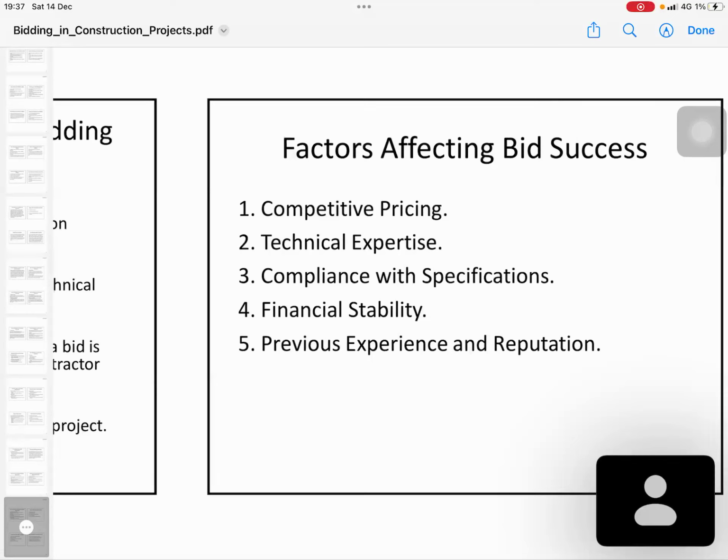The contractor didn't read the drawings properly, because the roof pattern and precast pattern are all in the drawing. So he priced based on the normal formwork rate, neglecting the fair-face. Finally he won the project, but he couldn't perform. The employer terminated that.